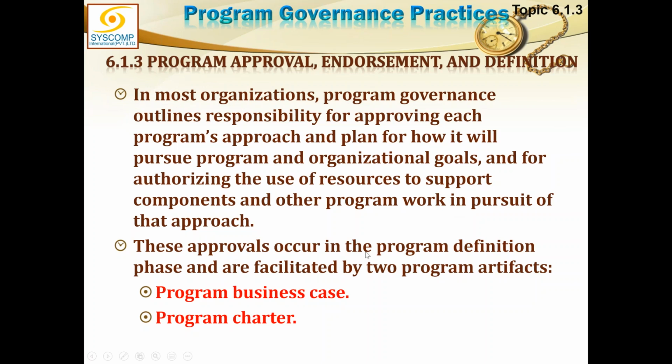So these approvals may occur in the program definition phase, facilitated by two program artifacts, which are the basic start points. First of all, we need to have a business case, and second, we develop a program charter.